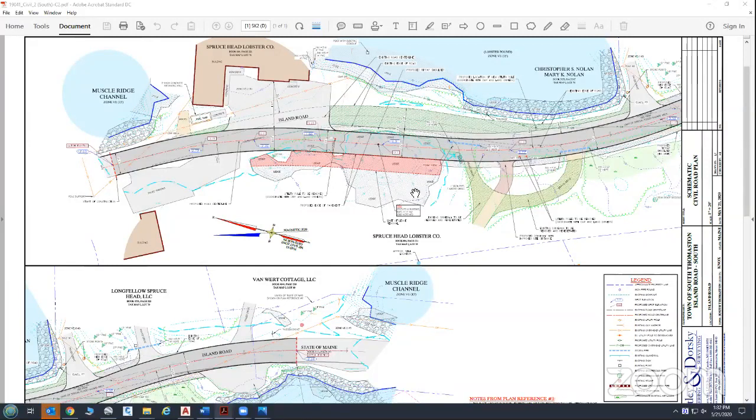But we've seen that start creeping up because of what's been going on with the construction industry. Ignoring the COVID-19 situation, the contractors have been so busy that they're booked a year out in advance, 2 years out in advance. So the competitive pricing kind of goes away a little bit. And I think that's really why there's a disconnect between oil prices and that liquid asphalt price and paving price right now. Okay. Thanks, Andrew.